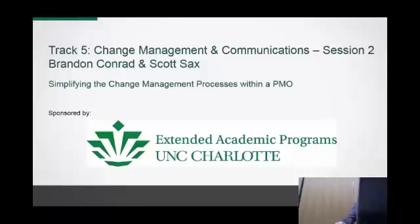We use Qualtrics right now. I don't know if anybody's familiar with Qualtrics. It's a survey tool, kind of like SurveyMonkey, if anybody's familiar with SurveyMonkey. And we're basically creating an anonymous survey where people have all the changes there, and they can check types of changes, whether they realize it's that type of change or not. And then different questions will pop up based off of how they've selected those types of changes, and they fill that out, and that provides us a nice format for the change, and we're able to report on it for metrics. If the CIO wants to know how many schedule changes we had in the month, we're able to show that also from just using the survey tool.